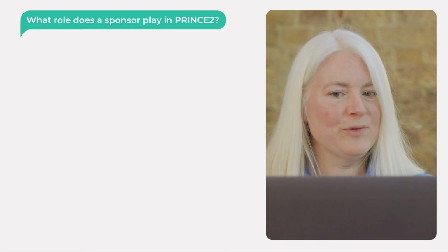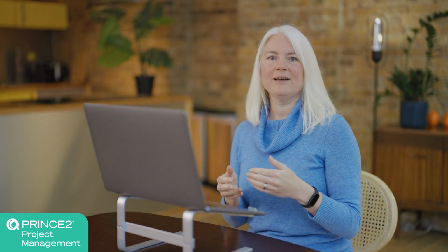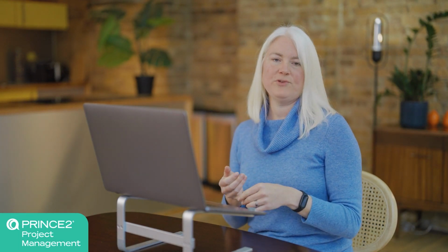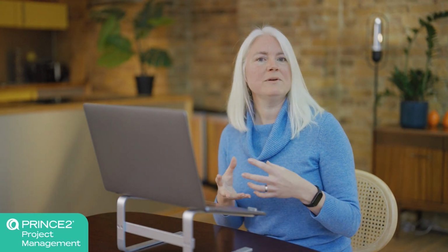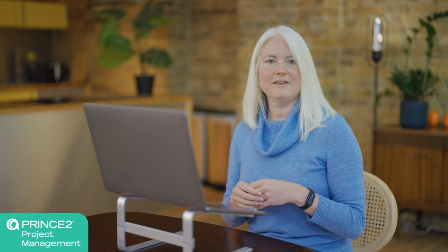Okay, next question. And this one is, what role does a sponsor play in PRINCE2? And that's an interesting question because we don't actually have within PRINCE2 the role of a sponsor. A sponsor is the driving force behind the project. They are the champion, and they may have a position within our project. The nearest equivalent that we have within the PRINCE2 project structure is the project executive.